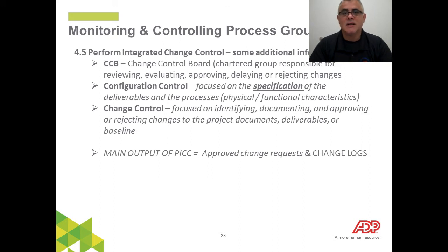But there are no such things as informal change requests. Every change, regardless of how big or small it is, must be documented and approved.